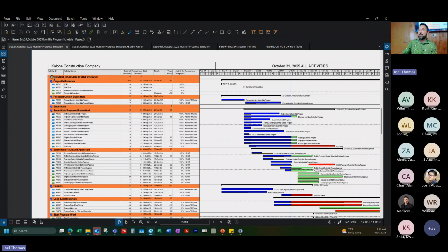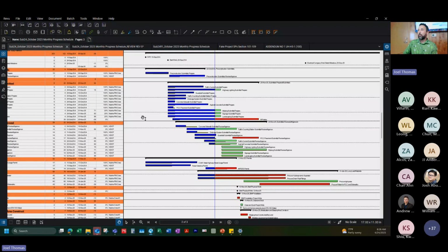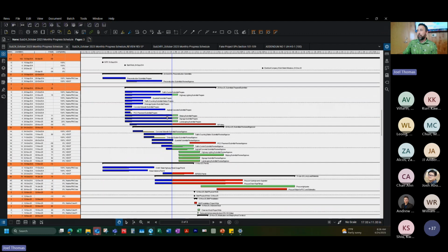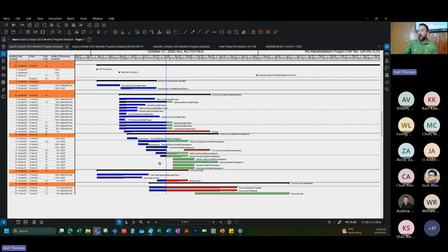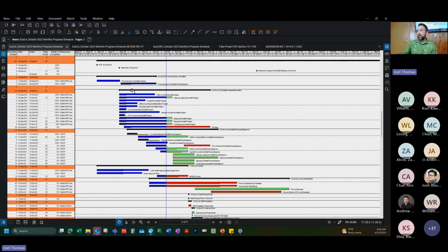When you see these highlighted headers, what's called a work breakdown structure, it's how the contractor has organized their schedule and they're breaking it into workable chunks. On the right side here, this is the Gantt chart. This blue line here is my data date line.